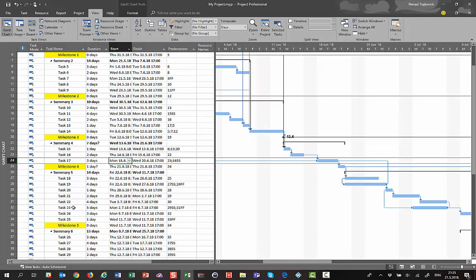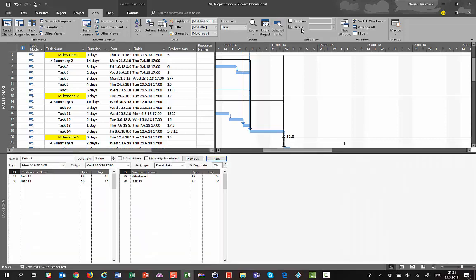So it means that you should remove all predecessors for this task, and of course remove this particular task which you want to delete from each and every single task for which it is a successor. Now with task form you can easily do that. I will show you task form.